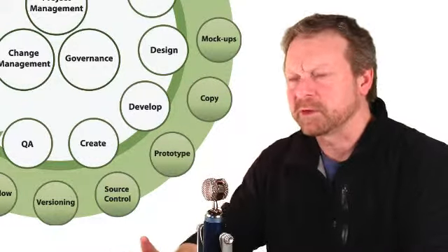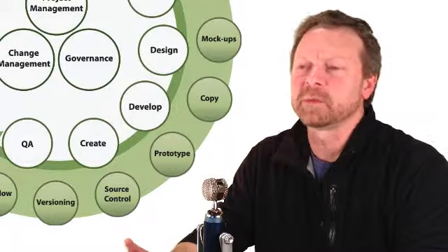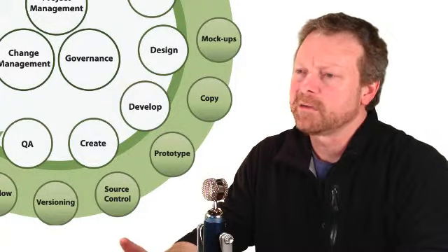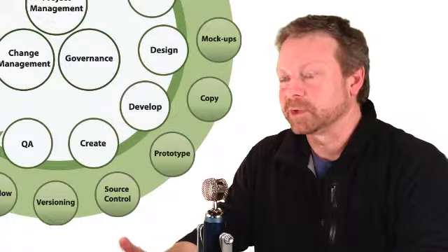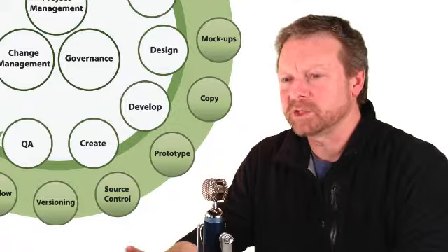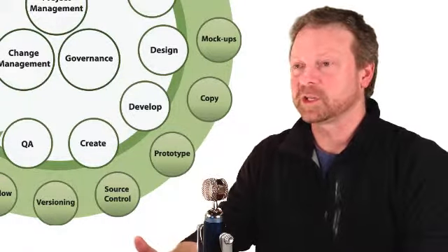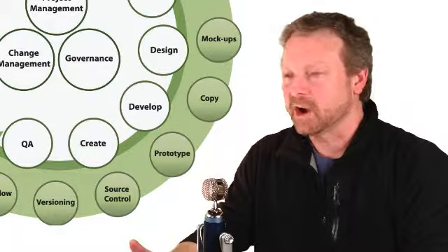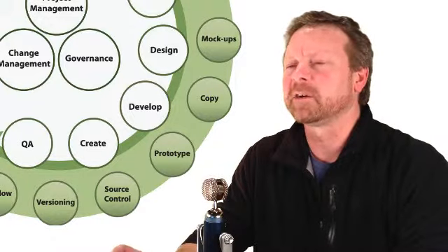Without that, it's very, very difficult for people to visualize what these requirements actually mean in their own personal context. From that, you'll get into the development of some copy, which is the actual text. What are you actually going to be writing? Many times we get into projects and we plan out all our pages. Then it comes time to define what they actually want to say, and it turns out they have a hard time trying to come up with what they want to say. So start working on that early.